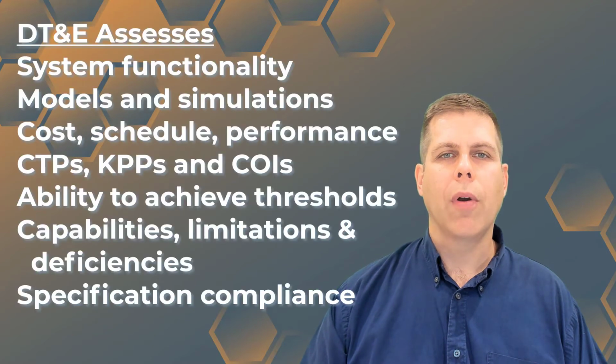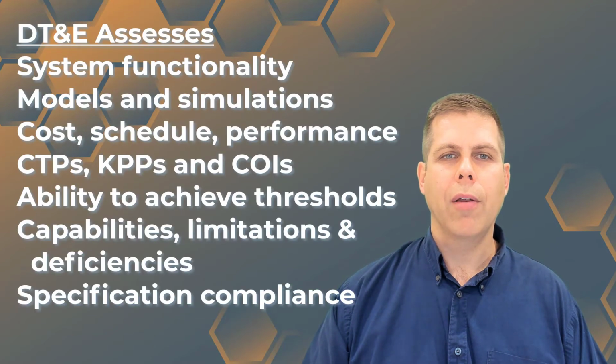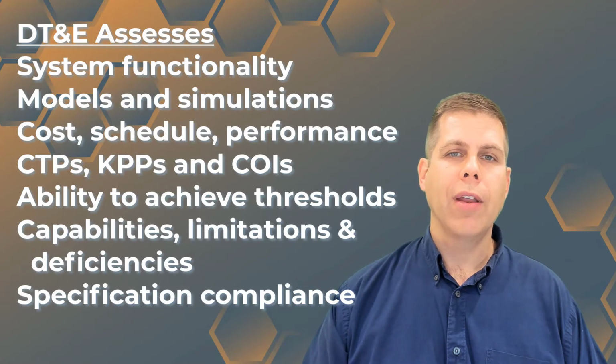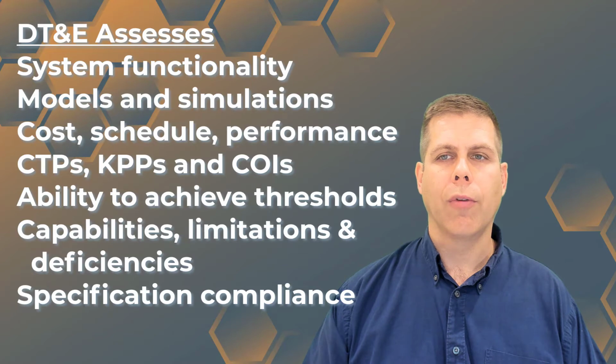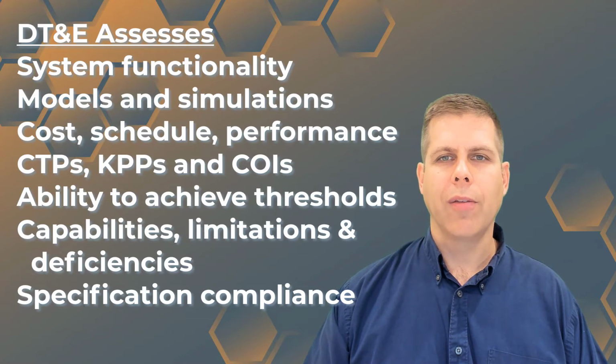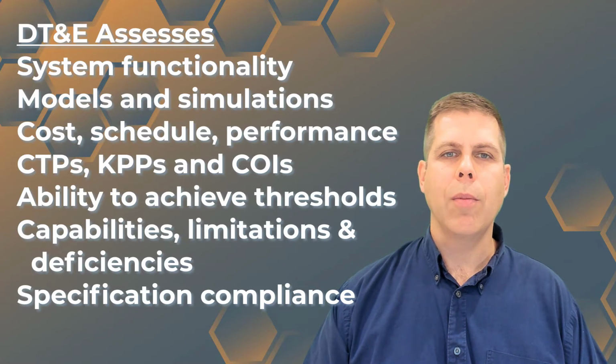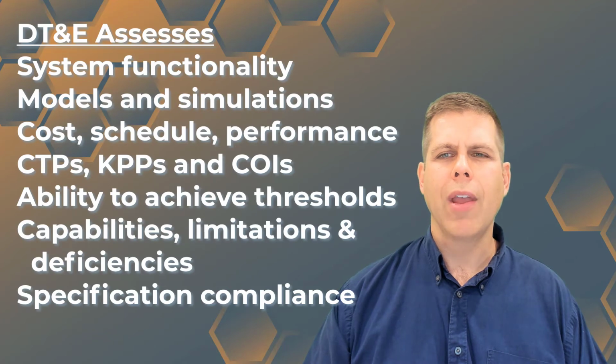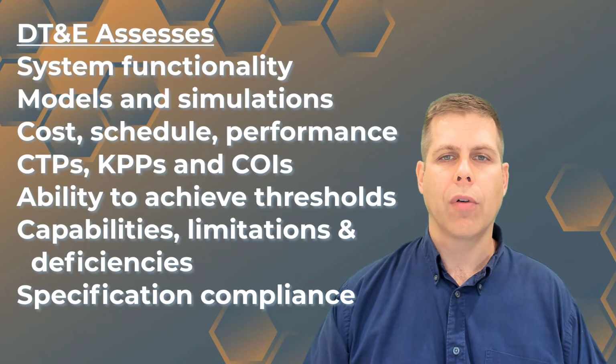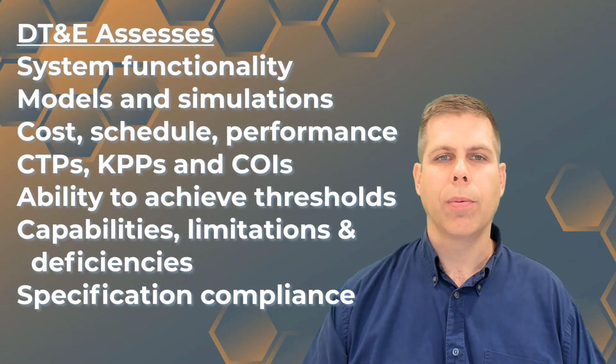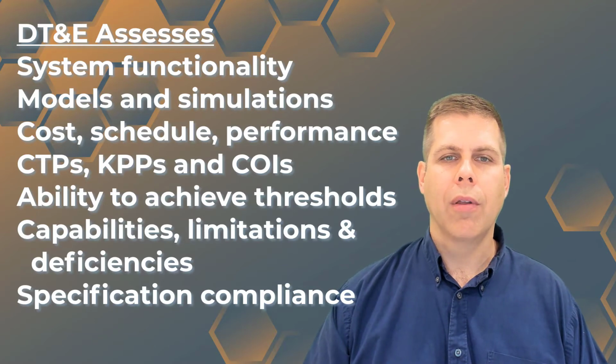A DT&E program will also validate system functionality, provide data to validate models and simulations, provide information for cost, schedule, and performance trade-offs, verify achievement of critical technical parameters and the ability to achieve key performance parameters, and assess progress towards achievement of critical operational issues, assess the system's ability to achieve the thresholds prescribed in the capabilities documents,